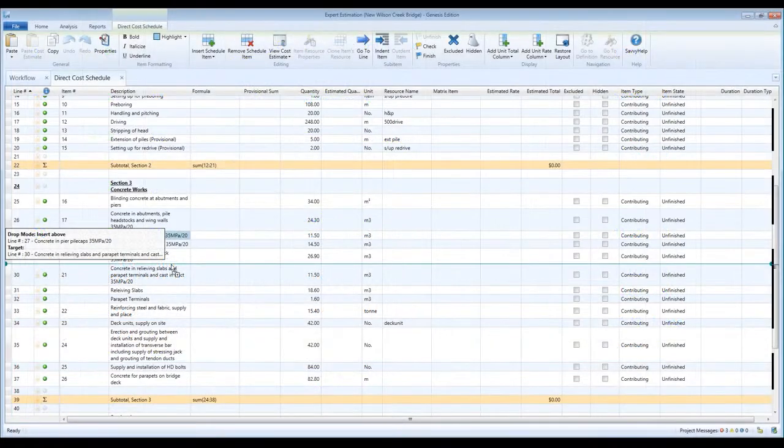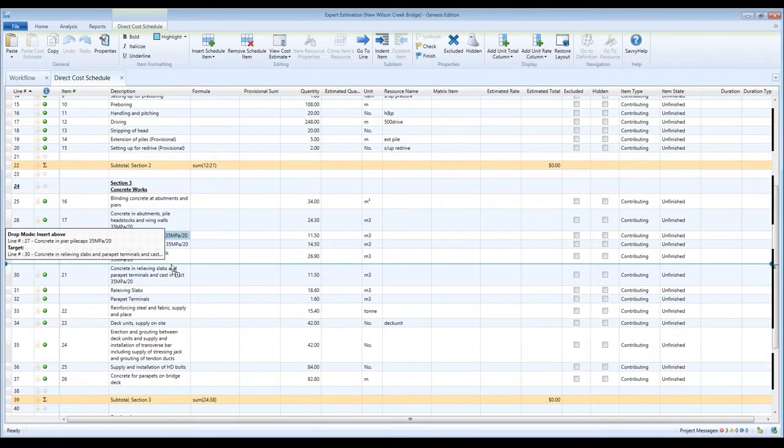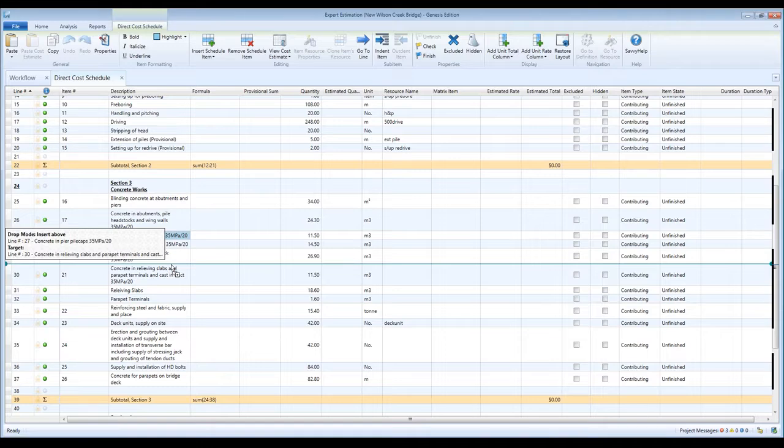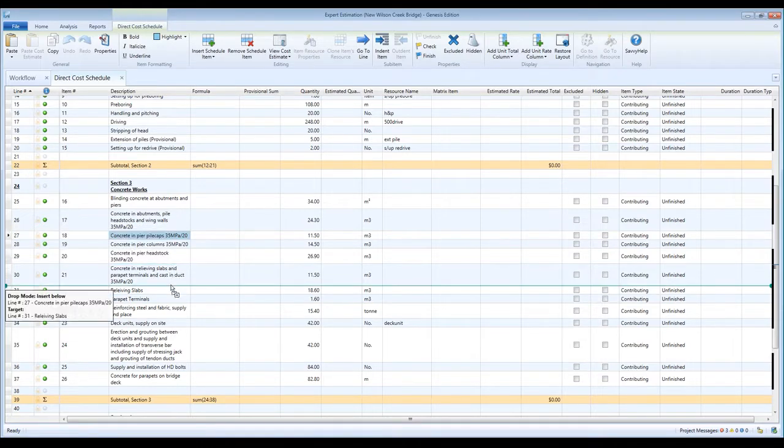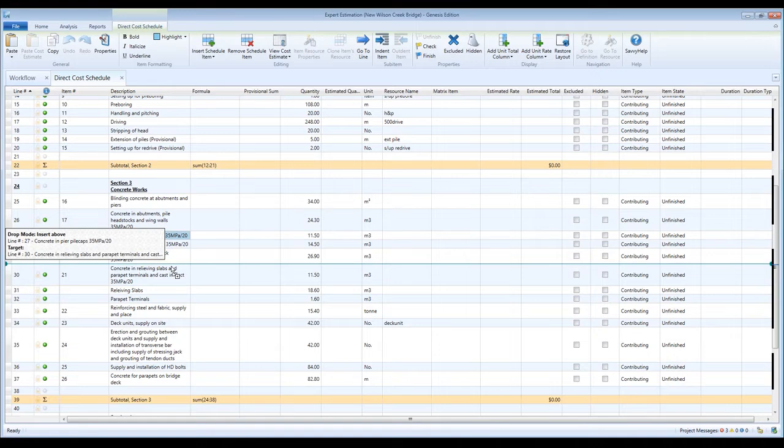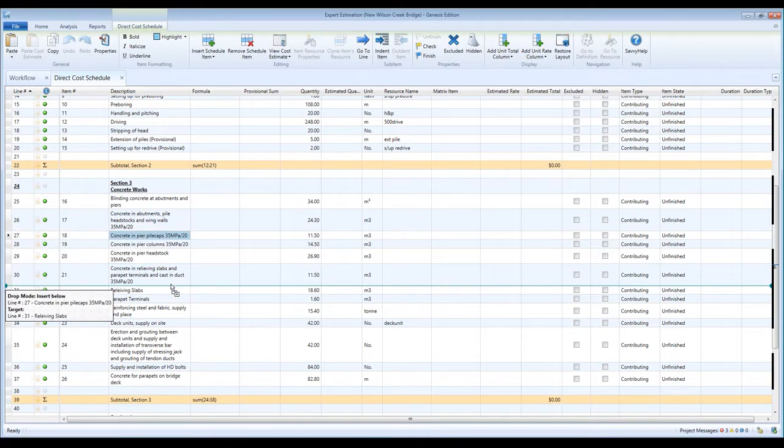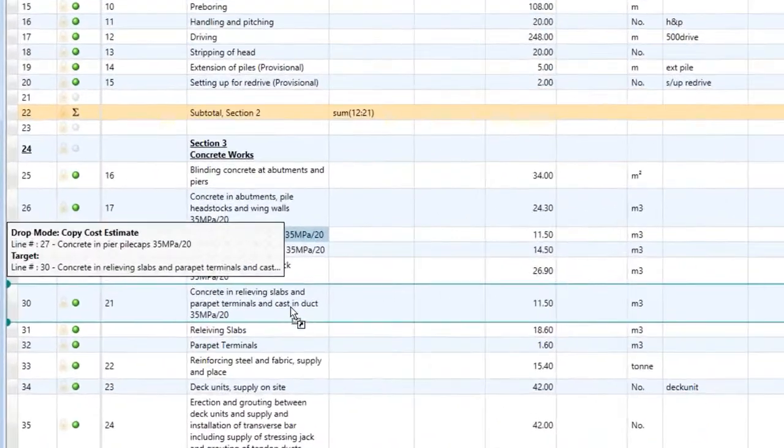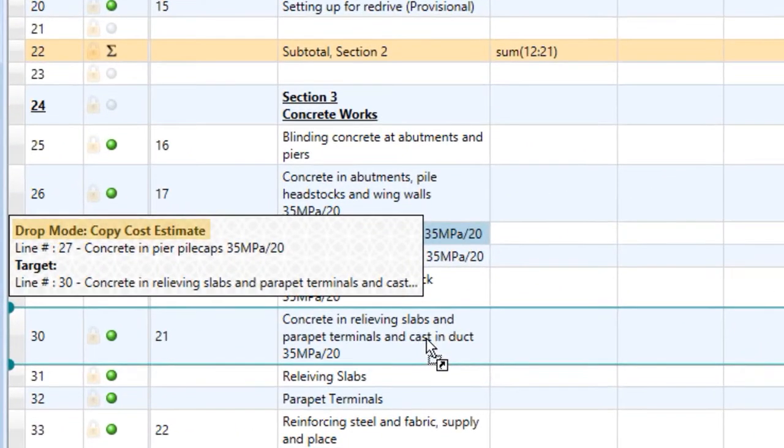Drop modes will vary depending on the data you've selected and where on the row your cursor is. You can see here a cost schedule item has three types of drop modes: insert a copy above the line or below the line. And if you drop onto the item, the cost estimate of the item being dragged will be copied, pasted, and appended to the target schedule item's cost estimate.